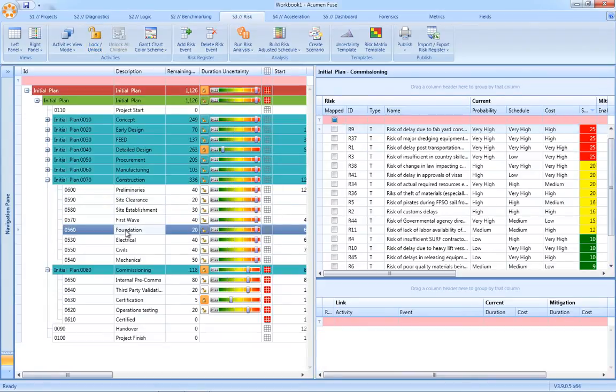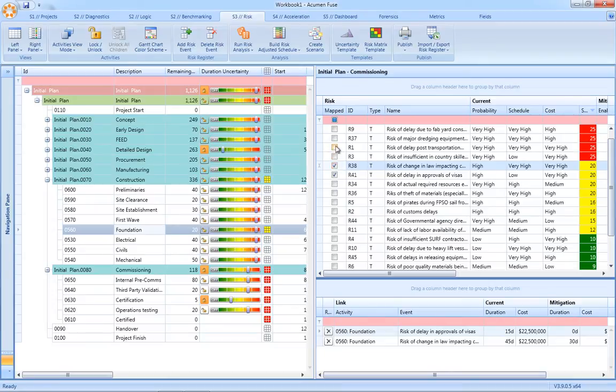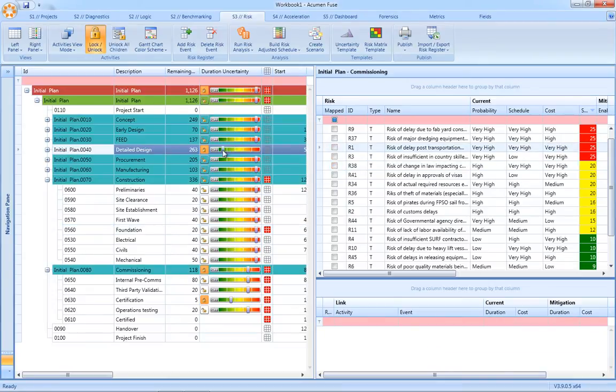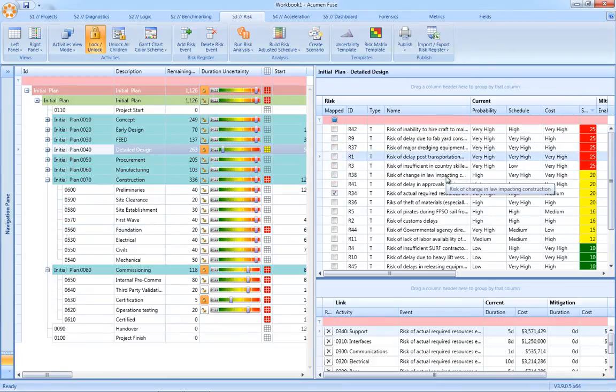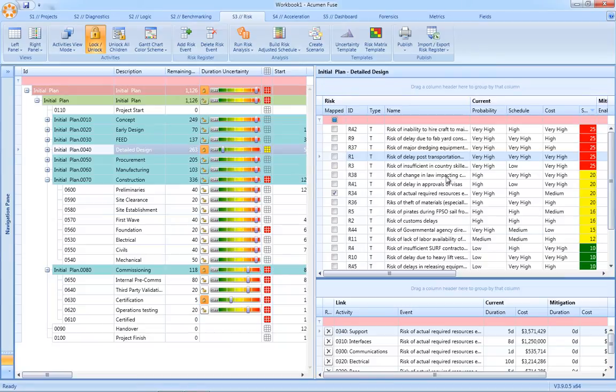In addition to mapping risk events to groups of activities, you can also map single risks to specific activities within the schedule. Once we've applied our certainty factors and risk events, we can then run our risk analysis.